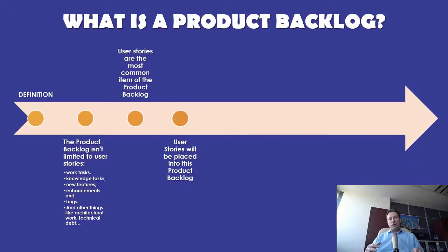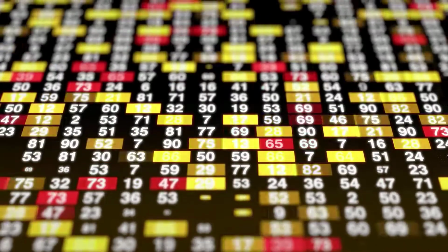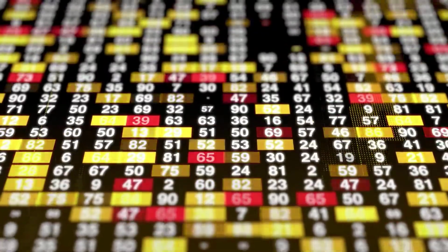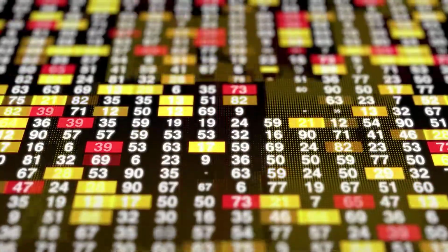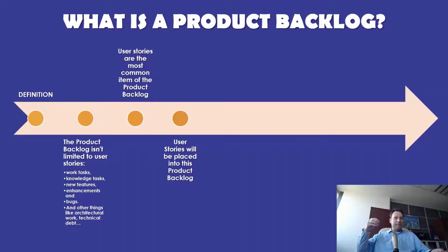And when you create each user story to be put into the backlog, make sure you assign a unique user story identifier to it. And this is important because it gives everyone a frame of reference within the project. So instead of having to recite the content of each story whenever you refer to it, all you have to do is reference a user story identifier. It doesn't matter what identifier you assign to any given story. However, a simple way is to use sequential numbers, assigning the first story you think of as 1, the second user story 2, and so on.